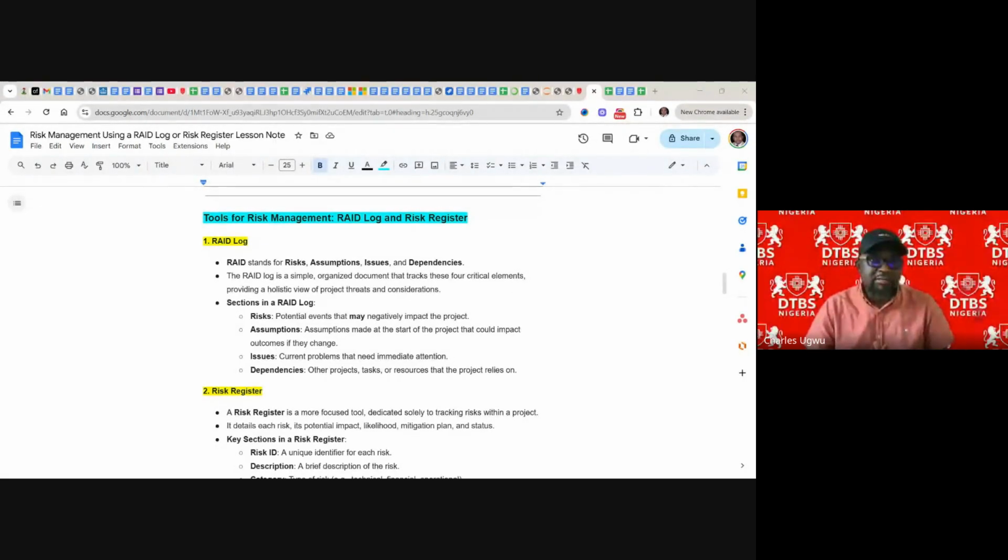After implementing a CRM system, it doesn't end there. For you to get the best out of a CRM system, you have to integrate it with other applications. That integration project can be handled by another project manager, not you. That project manager is waiting for you to finish implementation so they can start integrating the CRM with maybe Facebook or LinkedIn or others. So when you delay, their project gets delayed. That is what we call dependencies.